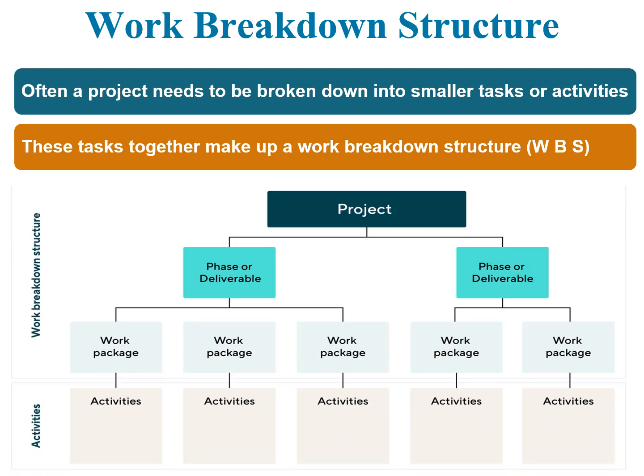This diagram shows a project divided into two phases — also called deliverables. In each phase we have a work package, which is the work breakdown structure unit. For each work package there are activities, so we list down the activities to be done in each work package. Each work package belongs to a phase or deliverable stage, which is part of the total project. We also assign a team or individual to each activity.